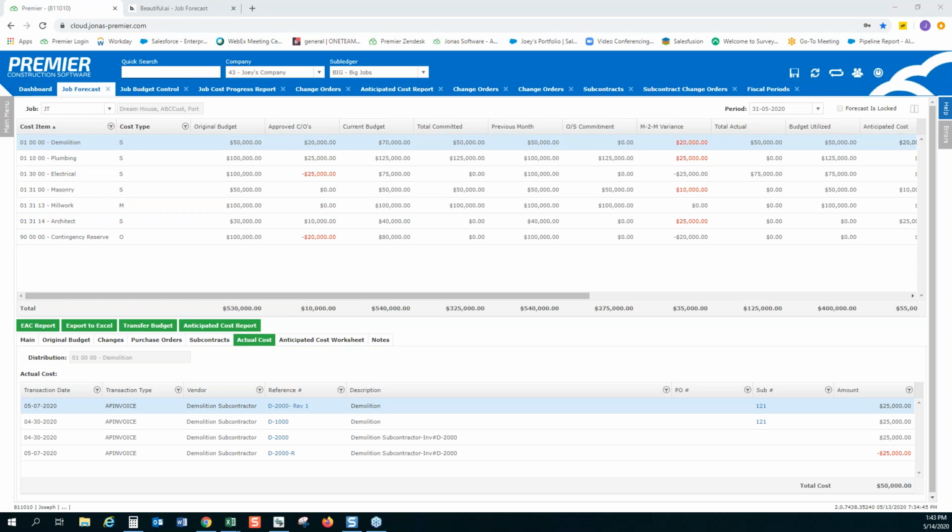Yeah, exactly. That's a great point, right? In my experience working for a construction company, our controller would make sure that everyone's costs were in and everyone's updates had been made so that nothing else was being entered. Because the other problem is if you have to remember to go back and do it on a job-by-job basis, there's obviously the risk that things get left out or you miss a particular job, and that just increases the risk of error. So doing it in one spot streamlines it and takes care of it. We usually recommend not closing it until you've essentially finalized that period.